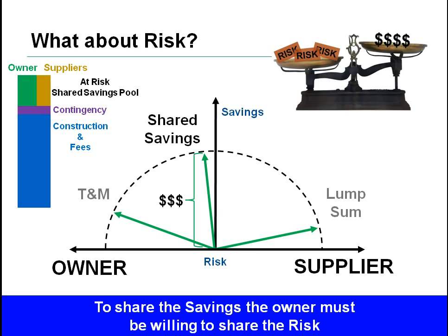Risk pool members agree on a plan for funding, administrating, and dispersing the at-risk pool and any aggregate cost savings and profit amounts. A relational IPD agreement would normally provide mechanisms for the owner and project team to collectively share those risks and protect the project team from catastrophic cost overruns. The upside is that the benefits from collaboration, innovation, and productivity improvements are significant and far outweigh the risk exposure.